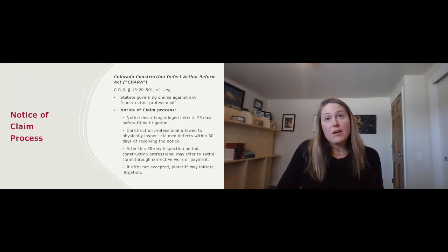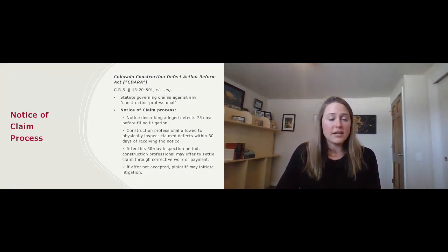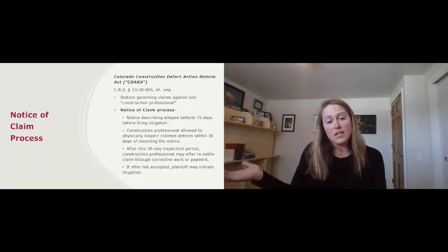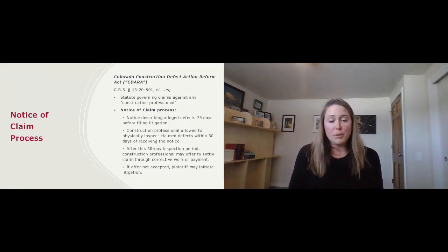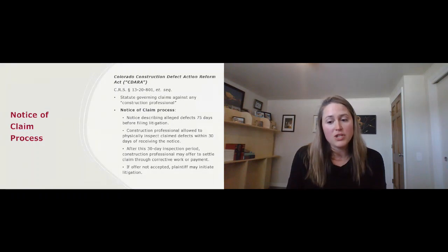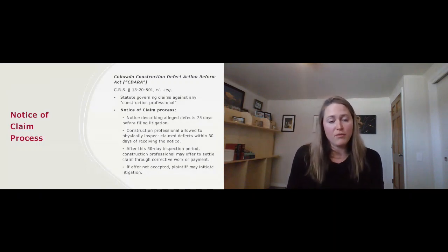So they don't have to accept the offer. If you offer money or even if you offer to make repairs, that plaintiff may decide to reject the offer and then they can initiate litigation. So they can still pursue a lawsuit anyway, even if you follow this process and you offer them a settlement of some sort. But it does provide this process by which you will be notified of a potential claim, and you do have an opportunity to inspect the issue and try to resolve it before litigation is initiated.